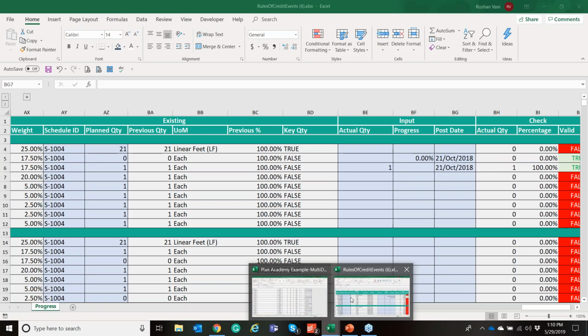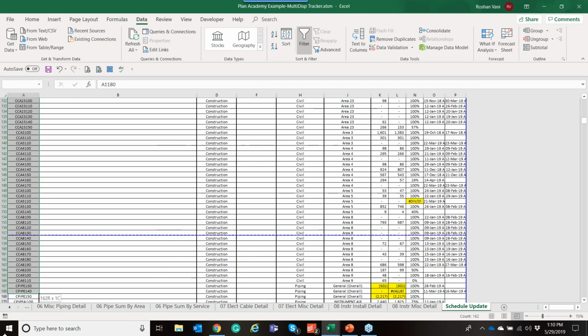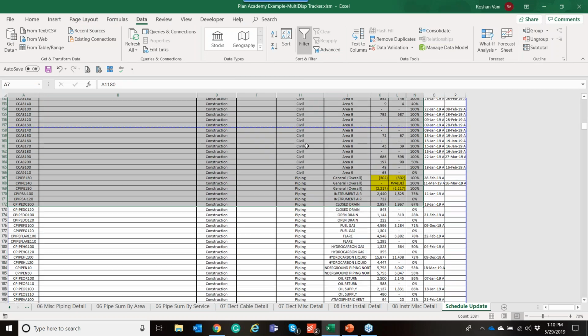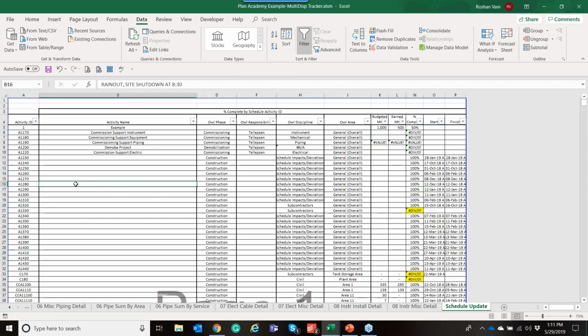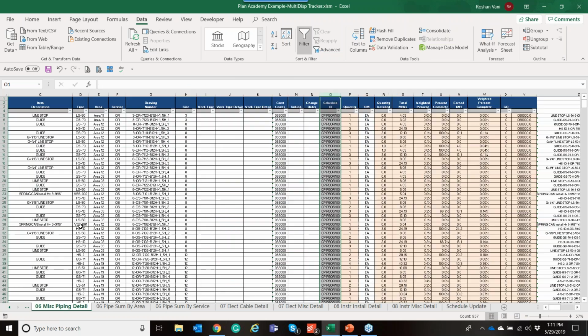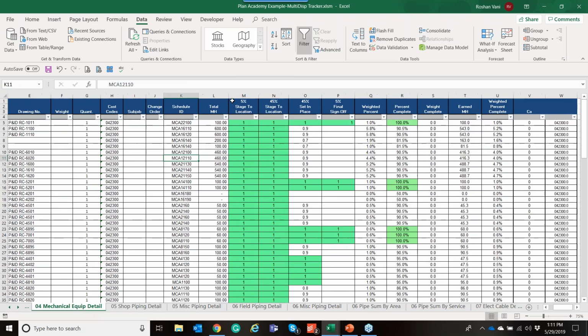It's no different than what we see in these spreadsheets that folks are doing, where you have some sort of reconciliation process back to your schedule, where you're running this all back in. And just to clarify, what we typically see, if you're going through this level of effort, you're going to stop at a level 3, in some cases maybe a level 3.5 in your Primavera, and you're going to do all the heavy lifting outside of Primavera in a level 4, level 5, where I call your level 4 these tasks going down this way, and your level 5 is kind of your rules of credit across the top. So that's your level 5 tracking, that's your level 4 tracking. And then it maps you back up to a level 3 is what I call it, your Primavera.